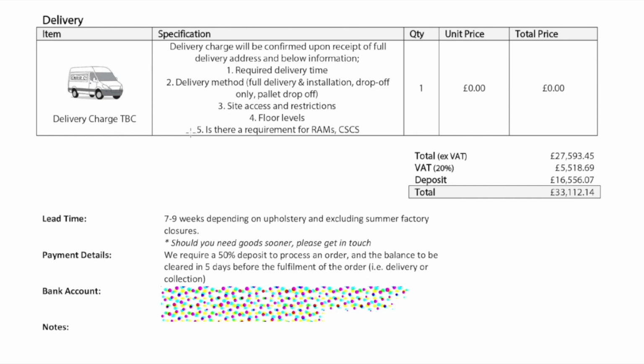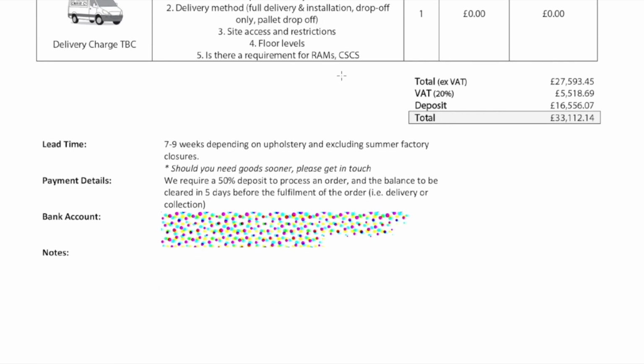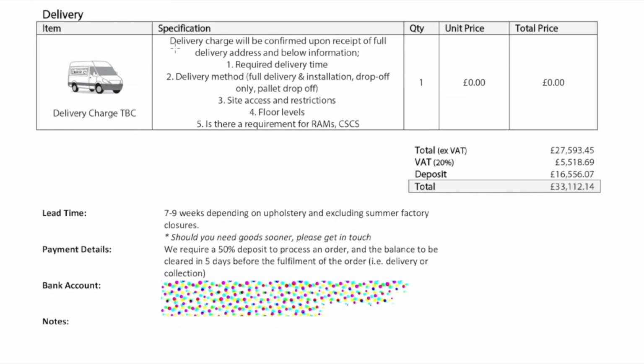Make sure that your quotes always say that, whether they are doing that or not, because if you are left with loads of cardboard boxes and plastic covers and all sorts of things, then that's actually another issue, and that's another cost that you need to think of. So what does this delivery include?